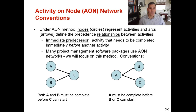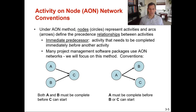Activity on node network conventions: under the AON method, nodes — which are circles — represent activities, and arcs — which are arrows — define the precedence relationship between the activities. We're only going to use AON network diagrams, not activity-on-arrow diagrams. We use nodes because they're easier and you can follow along with them better than with arrows.